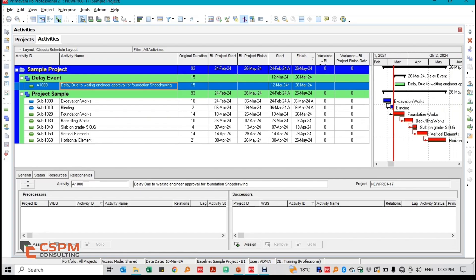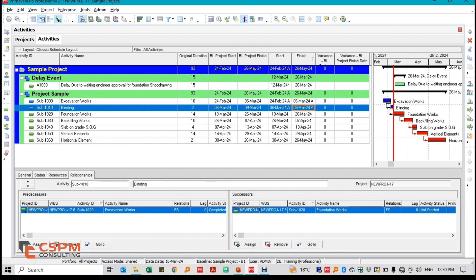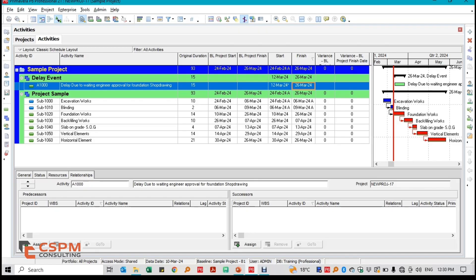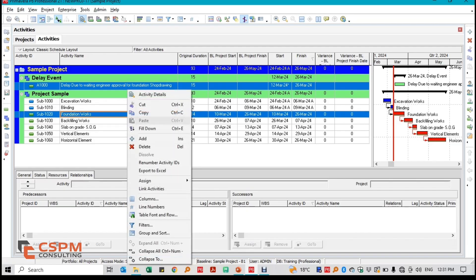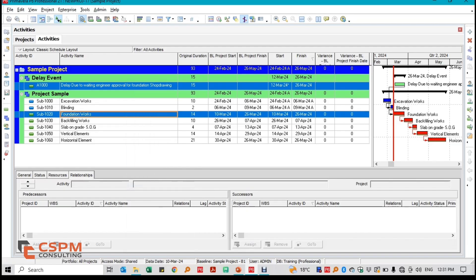This delay, lasting 15 days, is what we will analyze using the Time Impact Analysis method. I first take the most recent schedule update prior to the delay, which is from the 10th of March 2024. I then add the delay event's full duration into this updated schedule and link it to the foundation work, since foundation works won't be able to commence until the engineer's approval is granted. After adding the new logic, I run the schedule as of the 10th of March 2024.